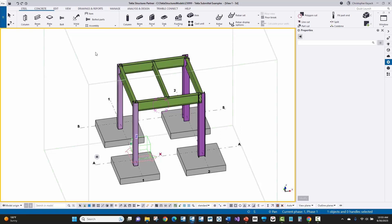The very first thing at the beginning of a project is that you want to verify the version of Tekla Structures that you're going to be working in with the fabricator, especially if they require you to submit the Tekla Structures model. It's really important to make sure that you're not working in a newer version of Tekla Structures than they are, because they can't open up that model if it's newer than their version.